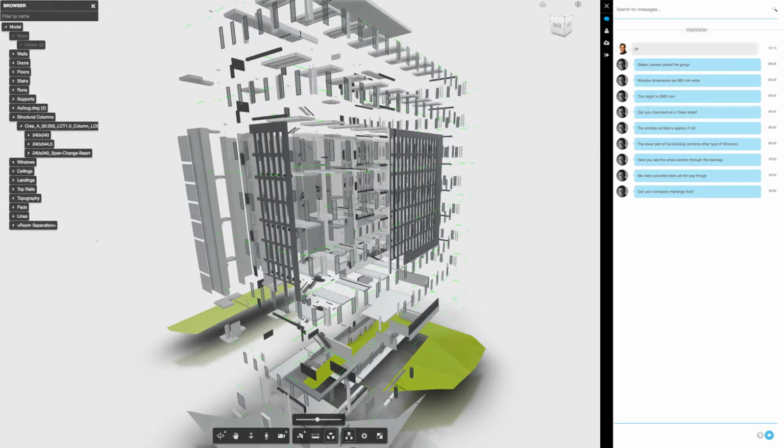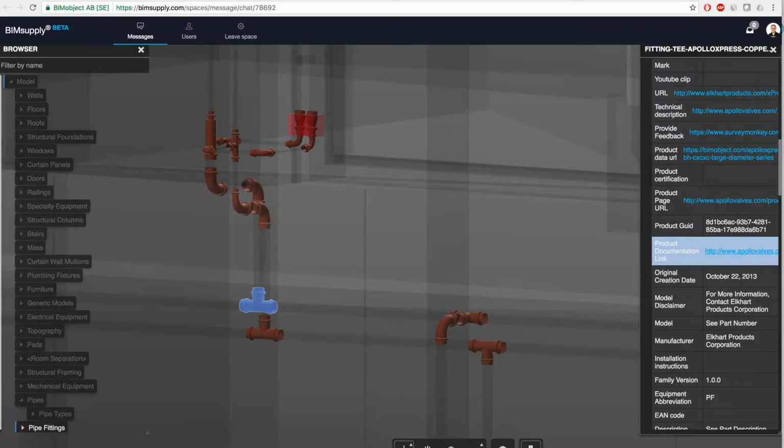This is just another, call it exploded view, where different actors can access the exact same data warehouse and model of a facility and not do estimating. We don't do that anymore. Another part of the forget disruption, we destroyed estimating. Now we cost define, because we have technology. It's ones and zeros. We can count how many doors of the EAXY123 model by door manufacturer Hundinger there are, and we don't have to say, I think we have, I better add 10%. It's there. It's real. It's ones and zeros.